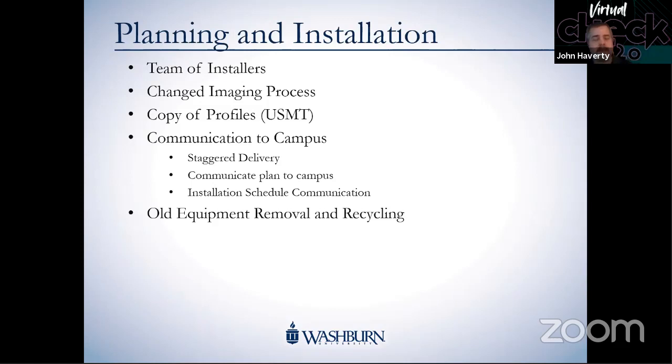Initially, we were planning on doing everything, but we didn't have the room for it. It was good that we were able to do the two semis, but we just didn't have the capacity to do everything as a buyback. And it didn't make sense as we started the process, because we got the list from Lenovo, from CDWG, of what would be considered buyback. And some systems that we had were old, so they were only worth a couple dollars. It didn't make sense to even go through the process to hold on to those and have those sent in. So we decided just to recycle some of them.